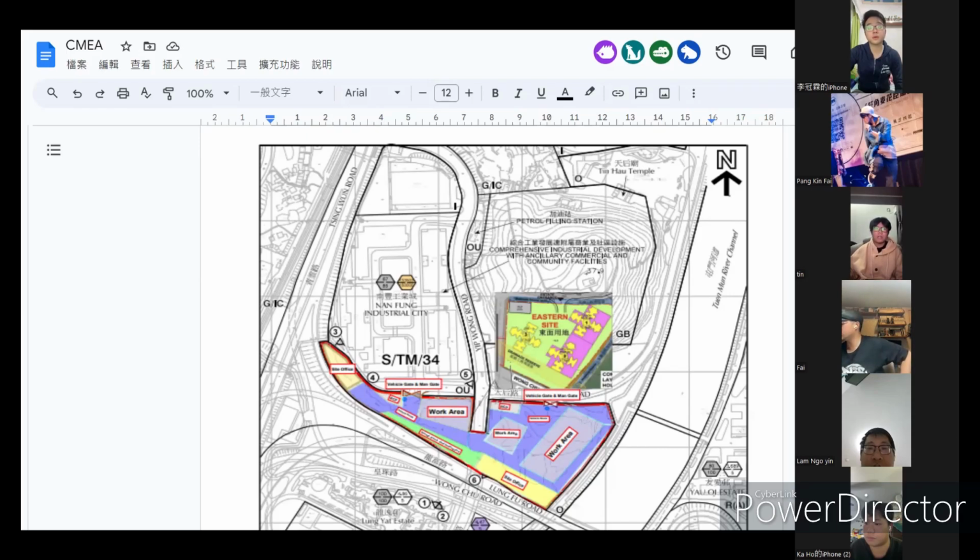In the centralized storage area and streamlined operation, the storage area is located at the bottom part of the site, away from public access. This area serves as the core for material storage, specially designed to accommodate precast concrete panels and other construction material. This area is fundamental in maintaining organization and efficient material handling.